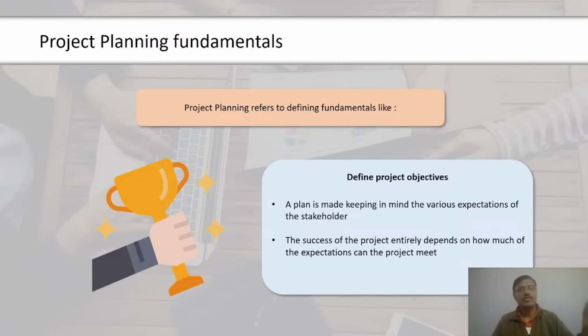It is essential to know if the required resources are available at that time, along with the time estimate of each of the activities. Since the schedule is calendar-based, it helps in estimating the same. The schedule network analysis technique generates the project schedule. There are various schedule network techniques. Critical path method relies on determining the critical path on the project schedule. Critical chain method is a variant of the critical path method, wherein the critical chain is determined based on logical, resource, and other kinds of dependencies between the activities.